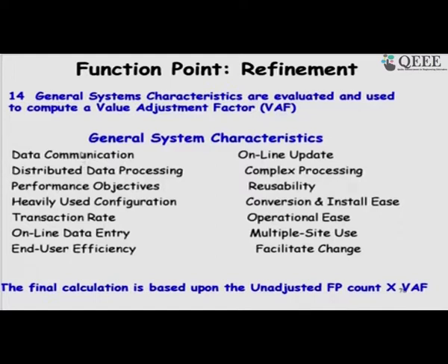We will see what the scale means, and then the characteristics that he considered are how much data communication is involved, is there distributed data processing involved, what about the performance constraints, how many configurations exist, what is the transaction rate to be supported, how is the online data entry done, is it a GUI or just a text input, end user efficiency, online update, complex processing, reusability.